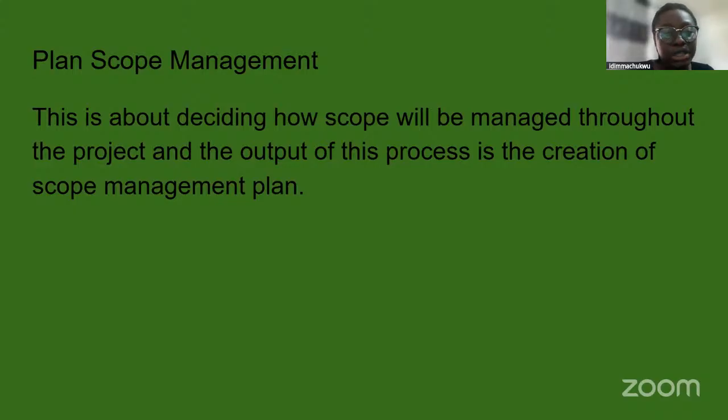A facilitated workshop is where you've already gathered your requirements, you spoke to the expert judges, you did your product analysis, you did the alternative analysis, and then you're coming to your stakeholders, which now also involves your project sponsor, to tell them, okay, this is the research we've done so far, this is the one that is feasible, this is the one that is not feasible. Which one do you want? Which one are we now going for? Aligning with them to get their approval is what the whole facilitated workshop is all about.